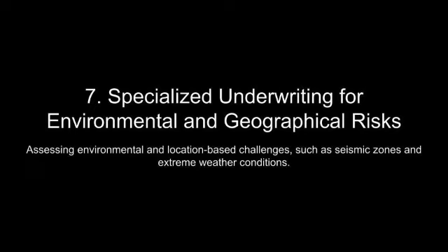Lien laws further complicate the regulatory landscape by intersecting with surety bond obligations, particularly in private construction projects. Mechanics liens provide subcontractors and suppliers with a security interest in the property they improved, enabling them to seek payment directly from the property owner in the event of non-payment by the contractor. However, the existence of a payment bond often supersedes the need for lien claims, as the bond provides an alternative mechanism for recovery. In jurisdictions where both liens and bonds coexist, underwriters must account for potential conflicts, such as double exposure to claims or overlapping obligations.